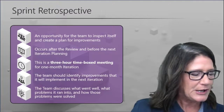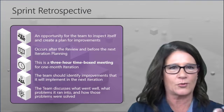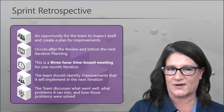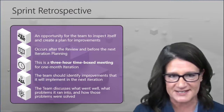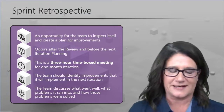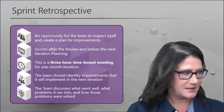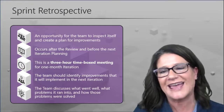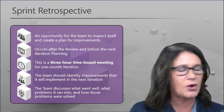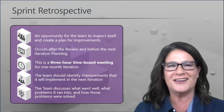The concept is keeping work in progress limited — it sounds counterintuitive. But if you focus on the work, move it to done, then pull more work in and move it to done — I'm not the world's greatest multitasker. It's very difficult to jump around. When I pull work in, get it done, then pull more — I actually get more work done. I enjoy using Kanban. In Smartsheet and newer versions of Project, if it says 'card view,' you can build it in the Gantt chart side and it will generate on the card side, or vice versa.